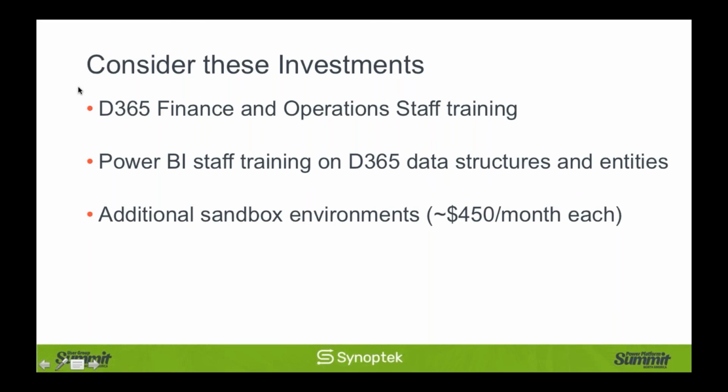So you're going to be enriching your internal team members and saving costs at the same time. And another suggestion I have is to purchase an additional Sandbox environment. It's approximately $450 per month. This environment would sit on Azure, but you want to have an environment where your end users can learn and demonstrate, because once Microsoft issues the environment to you, you're going to get two right away that you can touch, right? You're going to get your Sandbox, you're going to get your development environment. Your production environment's not going to be available to you right away.